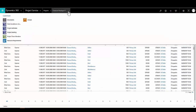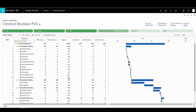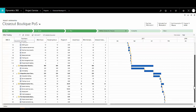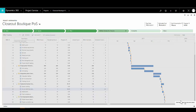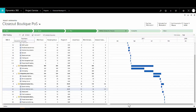We can also view progress through the project using the project tracking view. This is very similar to the work breakdown structure, but as well as individual project activities and the Gantt chart, we can also view the consolidated time submitted and approved through the timesheet functionality and how that impacts progress. For example, one activity has 10 hours estimated effort but 32 hours actually spent so far — which is clearly visible to the project manager. We can also track remaining time to give a final estimate of effort at completion. This is all vital information allowing the project manager to view real-time project progress and re-plan accordingly.